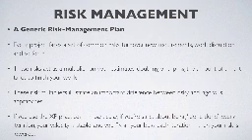If you use the XP practices, the extreme programming practices in particular, and you're strict about the done criteria in every iteration, your velocity is quite stable and you will be able to fix all your bugs at every iteration, and this would naturally lower your risks at the end.